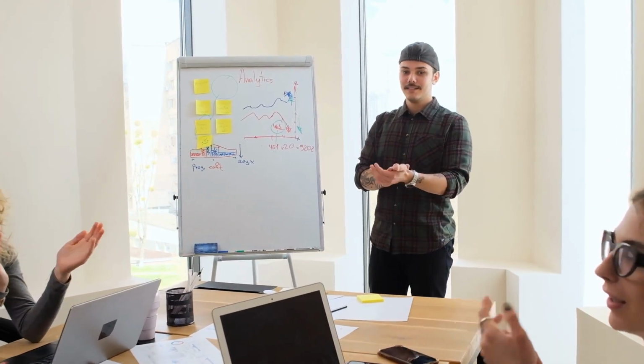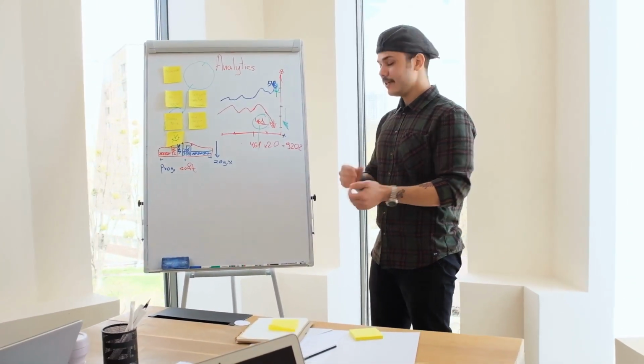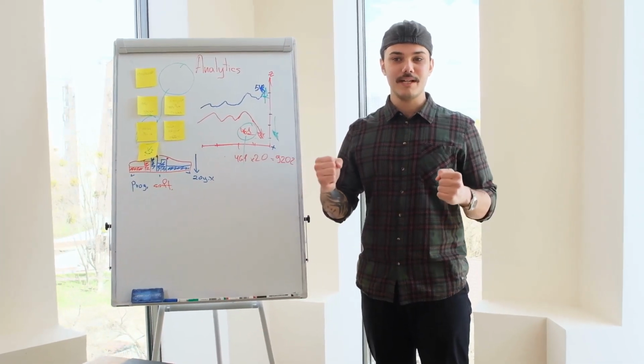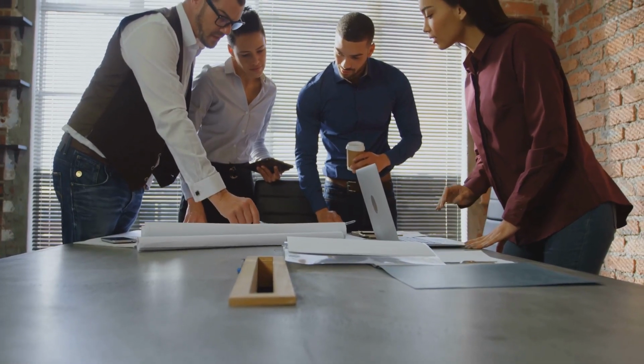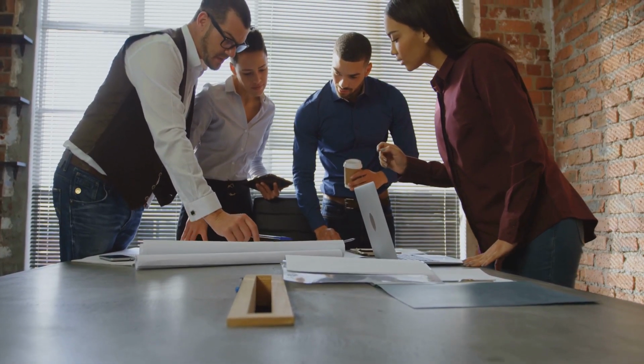Improving definition of done, DoD, is also crucial. The DoD outlines the criteria that must be met for a user story to be considered complete. If a story repeatedly spills over because it has not met the DoD, like it hasn't been fully tested or reviewed, the team should reassess the DoD to ensure it is clear and achievable within the sprint timeframe.